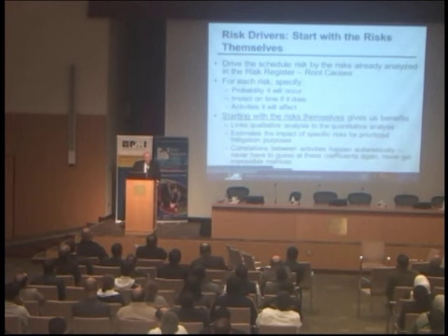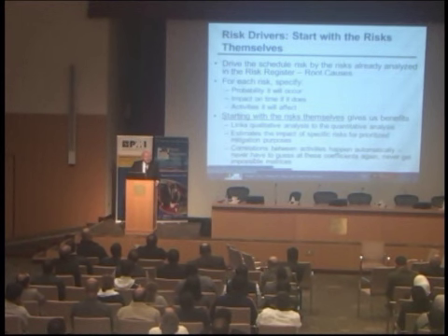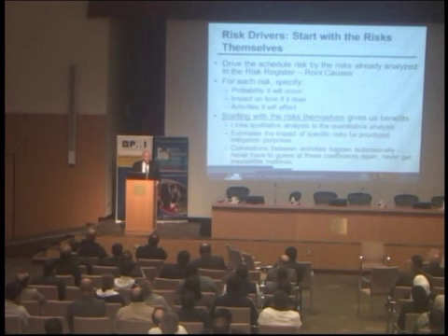If you pick a multiplicative factor of 1.12 for that particular iteration, that's the factor that's applied to the duration of each activity it's assigned to. All of a sudden, the one risk being assigned to multiple activities makes those activities correlated and gives them the right correlation coefficient value. So all of a sudden, we don't have to guess about correlations anymore. And I'm sure all of you lie awake at night worrying about correlation coefficients. I know you do. You just aren't willing to say so.